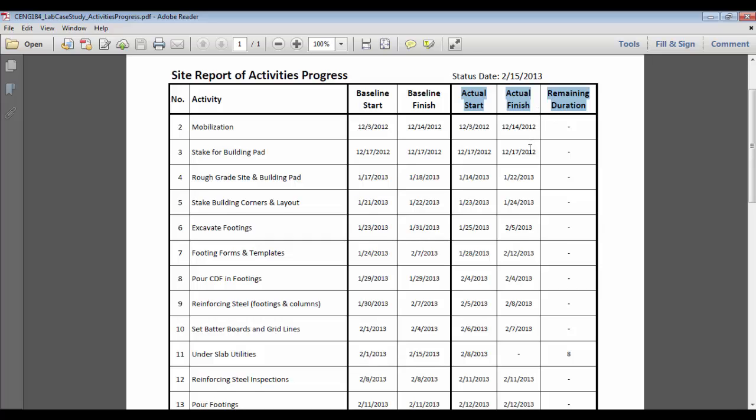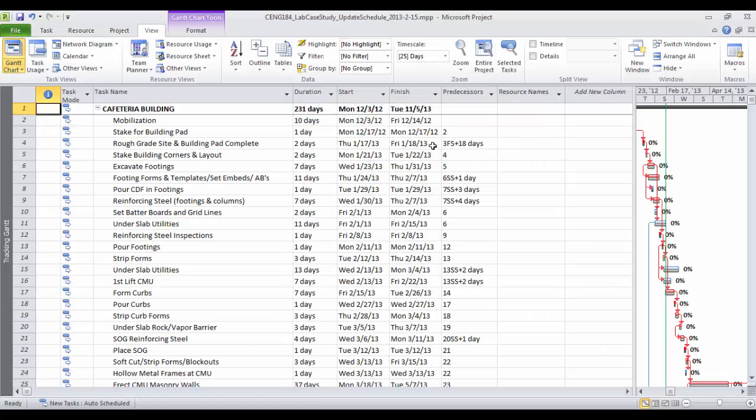Remember always, MS Project is a scheduling tool that was not intended for only construction. So it is a generic scheduling tool developed by Microsoft. So you have to have some tweaks applied to your own industry. In construction, this is the way I'm proposing, or I've seen people doing it this way. So besides that, we need to have another column, which is the actual duration. So we need to add 4 columns actually.